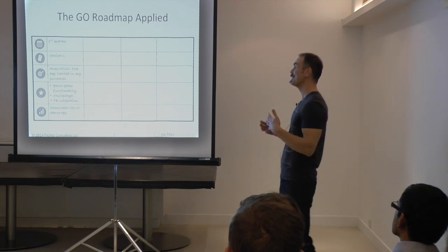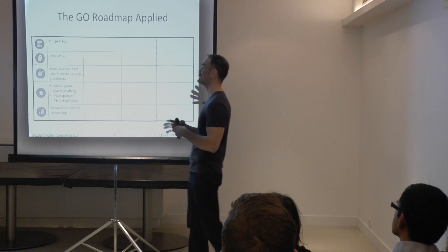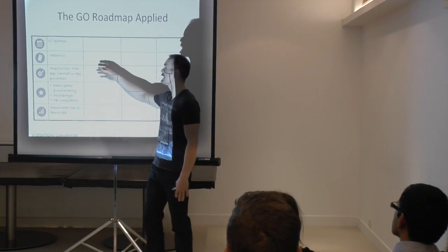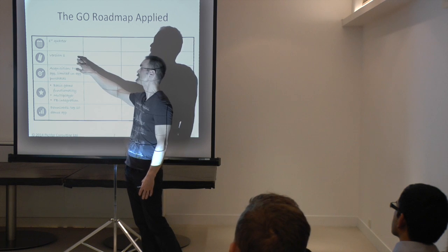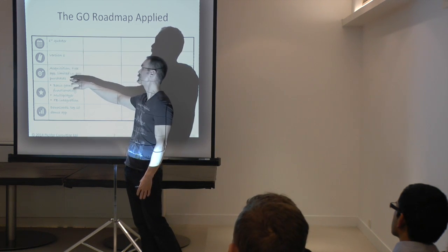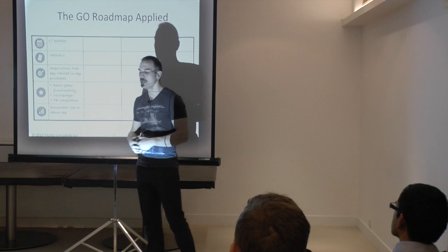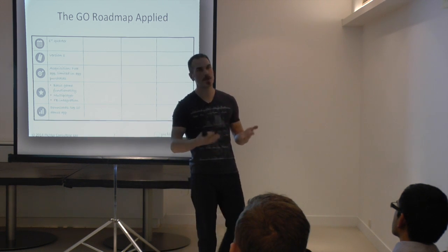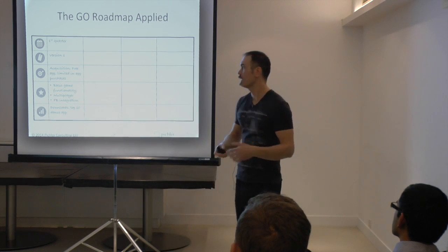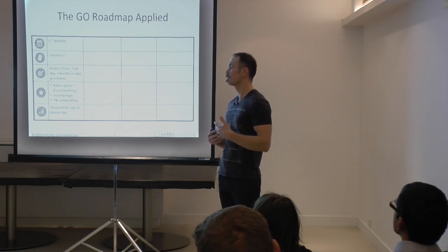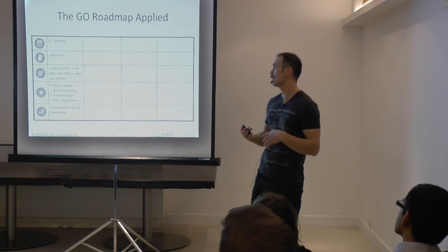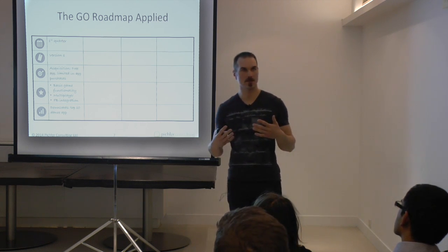You can see the difference now compared to a traditional roadmap is that we not only contain information around delivery time frame and what the version is called, but now we have a goal. And the goal of the first release is to acquire users, build a user community, and the 3 key features that I've put down provide a basic game functionality, multiplayer functionality, and Facebook integration.